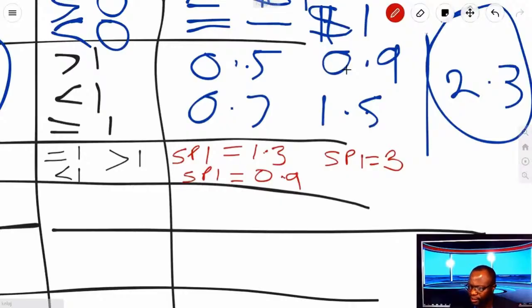What do those mean? An SPI equals 1.3 means your rate of efficiency schedule-wise is you planned to get a portion of work done, but you got 1.3 times that work done within that time period. It means that you're ahead. An SPI of 0.9 means you plan to get $1 worth of work done within a time period, but you only got 90 cents of it done.